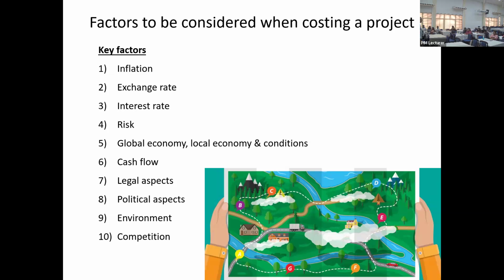You look at banks' bonds, 10-year bond, 5-year bond. Look at the rates. Look at a 5-year bond 1 month ago, and look at a 5-year bond 1 month later. If the rate has gone up, you know the interest rate is going to go up, because they predict the rates to move up. If you look at DFCC, I was looking yesterday, their debentures are going at 12%, while today 7.75% is the bank's borrowing rate.